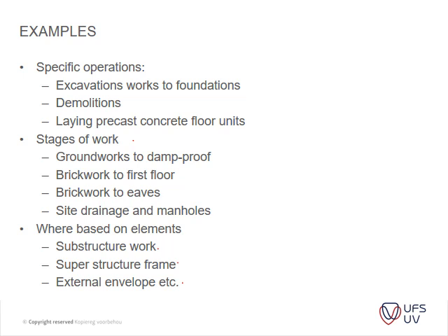What the guys usually do, what I've seen and what I usually ask for, is on your program, do your method statements in accordance with your program. So for instance, your excavations or your site clearance, start with your site clearance method statement first, and your excavations first, and so on. Okay.